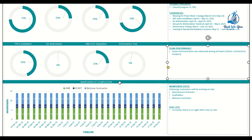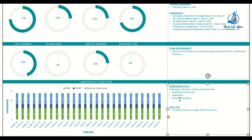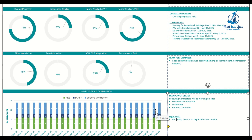At the bottom of the dashboard is the labor and manpower section, showing people on site. If you have multiple contractors — mechanical, civil, scaffolders, electrical, and others — they are shown in a histogram bar chart broken down by trade throughout the weeks and months. If there's a night shift, you can include that too; if not, you simply note there is no night shift.